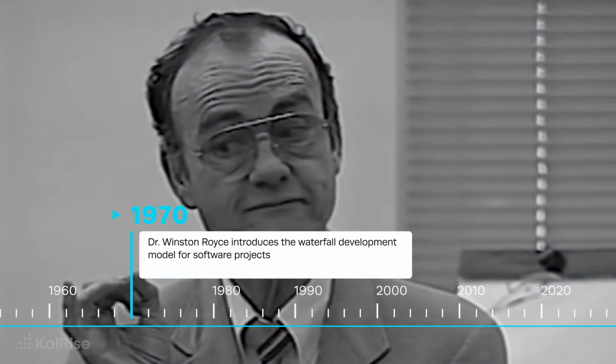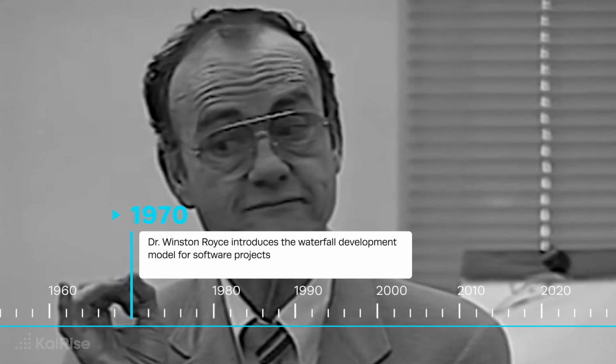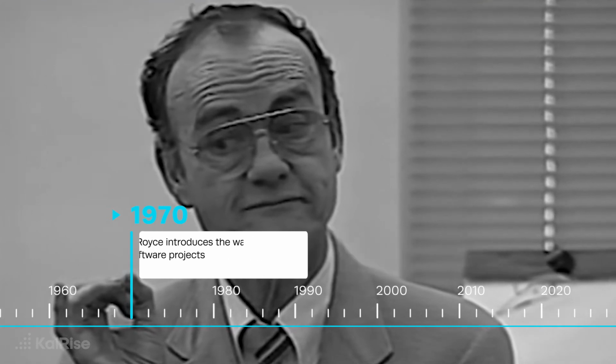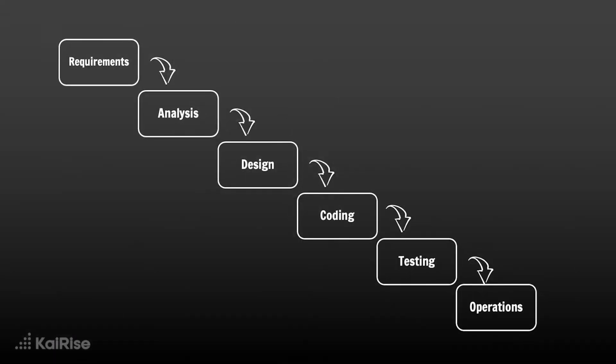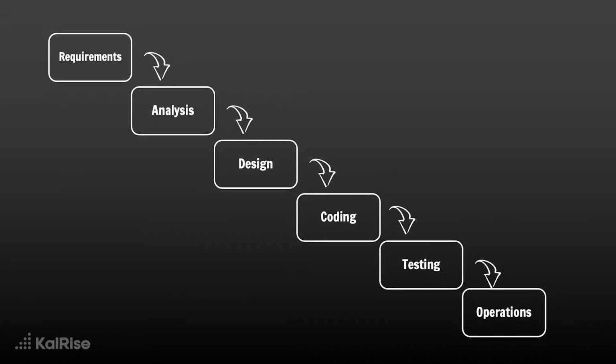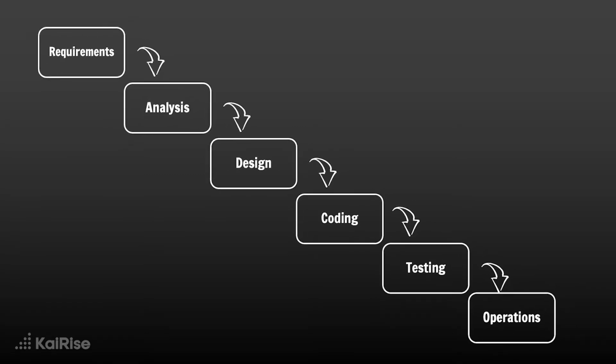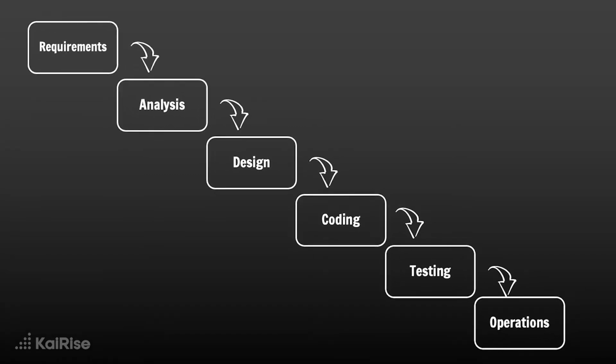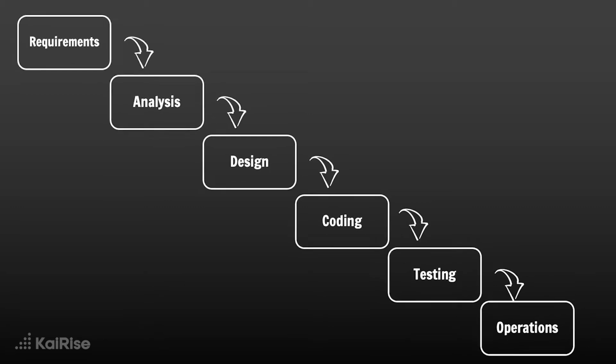Let's fast forward a bit into the 60s and 70s, when the software development world is coming about. Projects had been run for quite some time using what's called the waterfall method. Winston Royce introduced this construct of waterfall, and since that's how projects were run and organizations were good at running projects, we applied that to software development. The waterfall method is an interesting approach when you can plan things out, when there's a lot of predictability and repeatability, and not much will change. If you know the future will look a lot like today, then waterfall and predictive delivery is great.